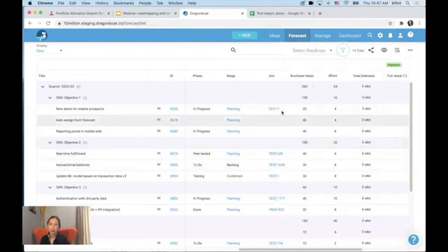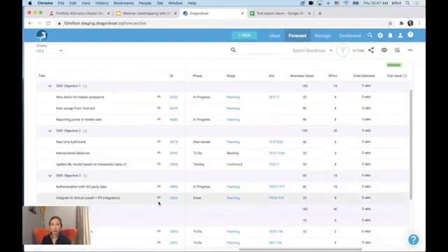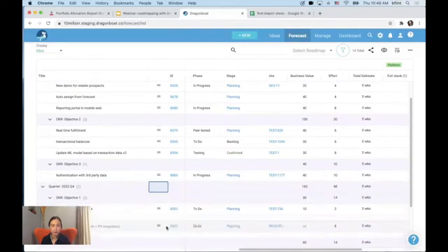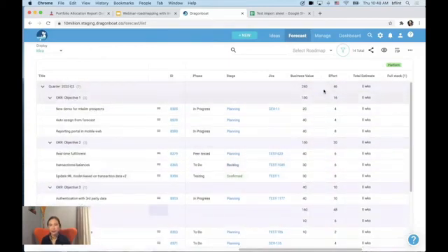Right, so let's use this example. In this example, there are 54 weeks of total effort required. We don't have 54 weeks. We only have, let's say, 40 weeks. So what do we do? Based on the allocation we have here, we know that objectives 2 and 3 are taking a lot more allocation. So objective number 3 may give up some of the resources to help with objective number 1. For example, in this case, we'll move one of the objective number 2 features to the next quarter. If we move this to the next quarter, let's see, I'm going to drag this to the next quarter. Number 3. So now we have a different allocation. We have enough resources to work on in this quarter.